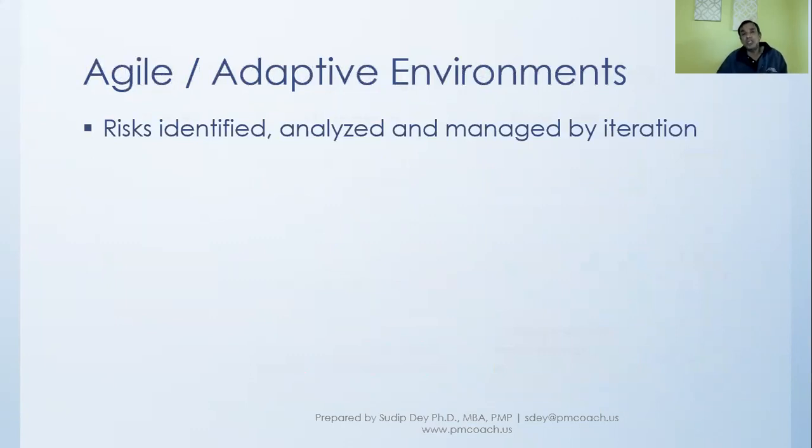When we move to an iteration, risk is analyzed, identified, and managed for every iteration. So as you go through the iteration, you ensure that you have control on the risk. Even the risk document is a live document, changing as we move along with iteration, so the risk gets mitigated much better with that approach.